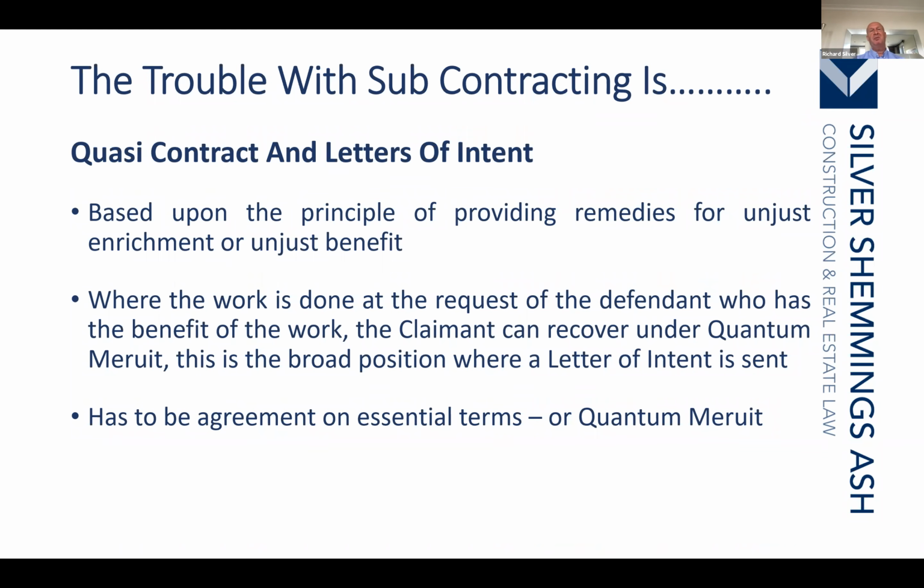Now, I've acted for many subcontractors where that's exactly what's happened. And when the contract has been sought to be put in place, behind the scenes, I've assisted the subcontractor to avoid that subcontract being put in place by asking some very simple questions. In that you are now placing the subcontract some 6 months after we've started, there are problems associated with what that contract now places as obligations upon us because we didn't do them.